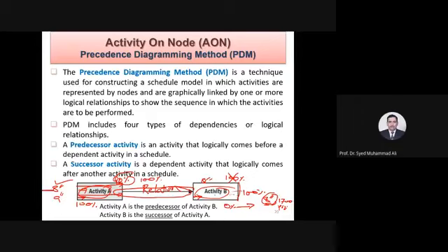1,00,000 بلاک تب کمپلیٹ ہو کے ڈلیوری کی طرف جائیں گے، وہ ایگزیکیوٹ ہوں گے جب ہمارا ڈیزائن مکمل ہوگا، اور اس ڈیزائن کی آؤٹ پٹ یہ ہوگی کہ 8 انچ کے بلاک چاہیے. اور دیکھیں آپ نے رسک لیا ہے، خدا نہ خواستہ 9 انچ کا سائز فائنلائز ہو گیا تو نو پرابلم، ایکٹیویٹی بی ختم نہیں ہوگی، نو پرابلم. وہ جو 1,00,000 کی کاسٹ ہے، 20 لاکھ روپیہ فار ایگزامپل بلاک کی، وہ کوئی پرابلم نہیں ہے.